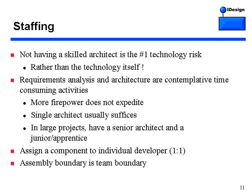The architect decomposes the system into components. Once you have the breakdown into components, you need to assign them to developers. Assigning components to developers should be done in a one-to-one ratio — don't have two components assigned to a single developer at a point in time, and don't have two developers working on a single component at a point in time. If two developers work on a single component, they'll constantly step on each other's toes. If a developer works on two components at a time, that developer is likely to be the bottleneck for everybody depending on those components.